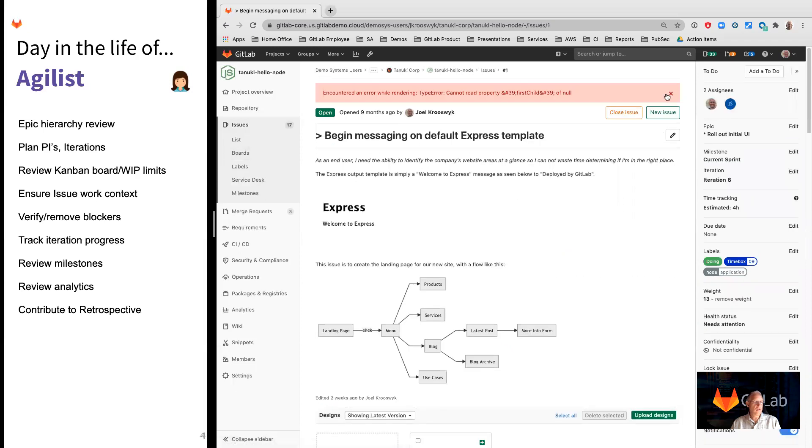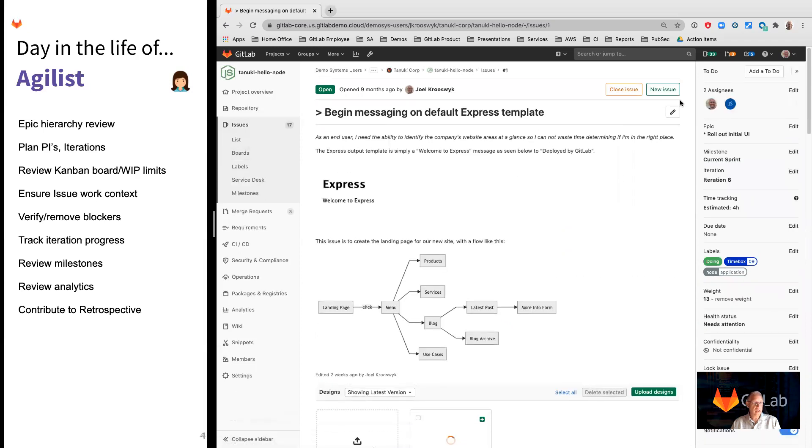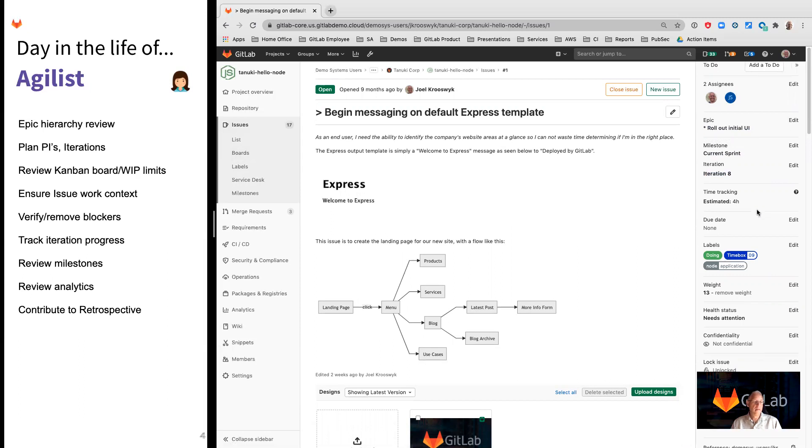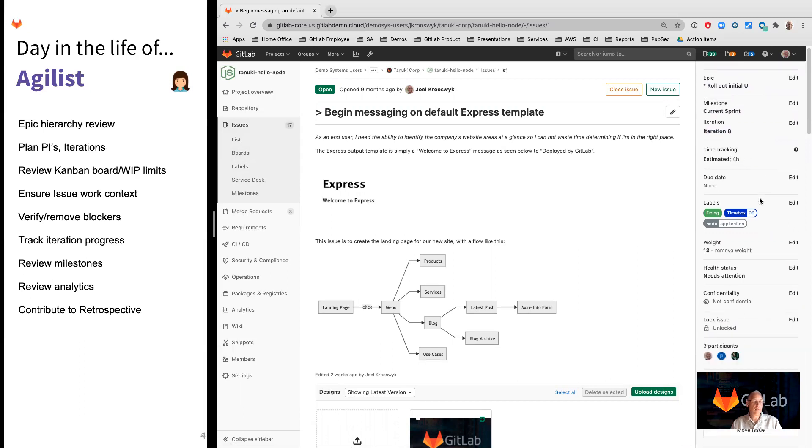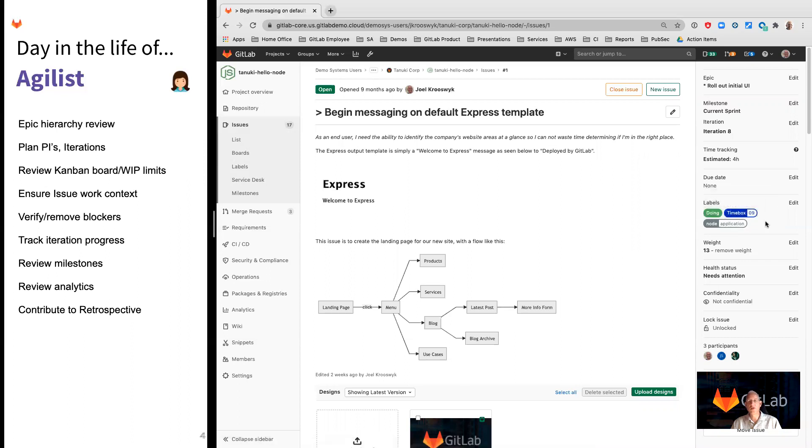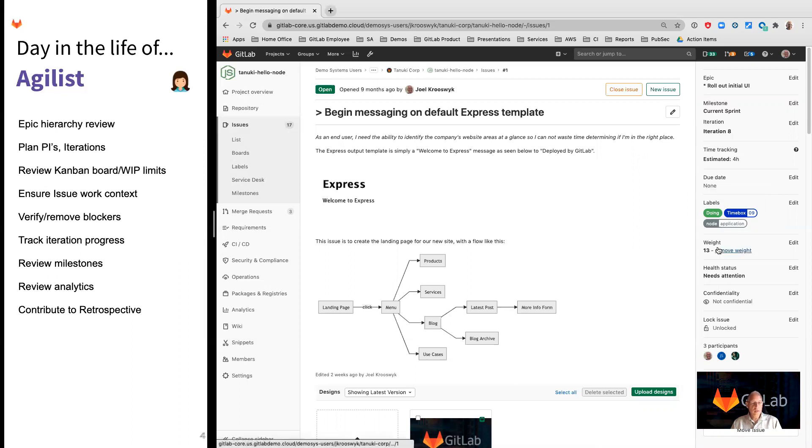Dragging across, you'll notice that the weight and the number of issues is being reflected here. What I can also do is actually compose a limit like a Kanban limit on these so that we know when we've reached our limit for any of these program increments. Same thing applies if you're doing sprint planning or anything else. Notice I've got a generic label here of time box. This is any kind of milestone type event or any kind of schedulable content. So any of these boards can be configured in a useful way that's relevant to the workflow that you have.